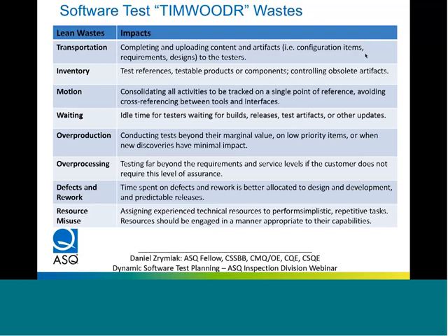So you want to have the best resources dealing with the most complex and critical items. This is even more the case when you have a limited pool who are actually eligible to test something. For example, if it's security cleared, only those with that clearance can test the restricted parts. So while you have restricted parts prioritized, you can't have their time consumed with less important activities.